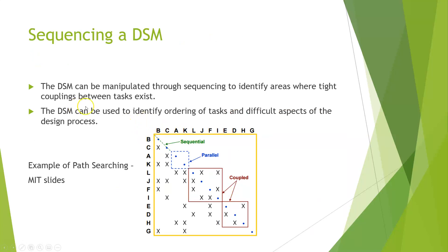The problem at hand is sequencing a DSM. The DSM can be manipulated through sequencing to identify areas where tight couplings between tasks exist. These tight couplings are shown on the diagonal of the matrix and can be identified once a DSM has been sequenced. Task A is no longer at the top — now it's task B. They're sequenced this way to give us an ordering of tasks, and a DSM can identify ordering of tasks and difficult aspects of the design process. Task B does not depend on any other task, so B can be ordered first, then C goes after B because C only depends on B. This is essentially permuting the rows and columns to get a lower triangular matrix.